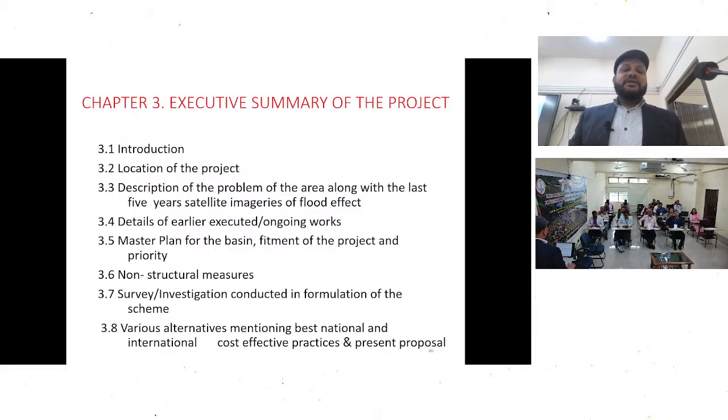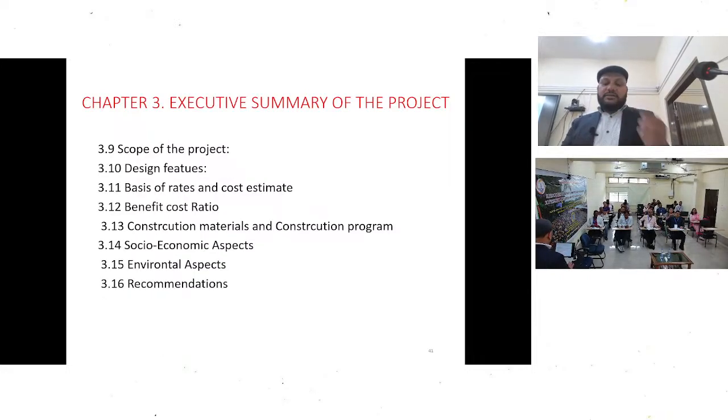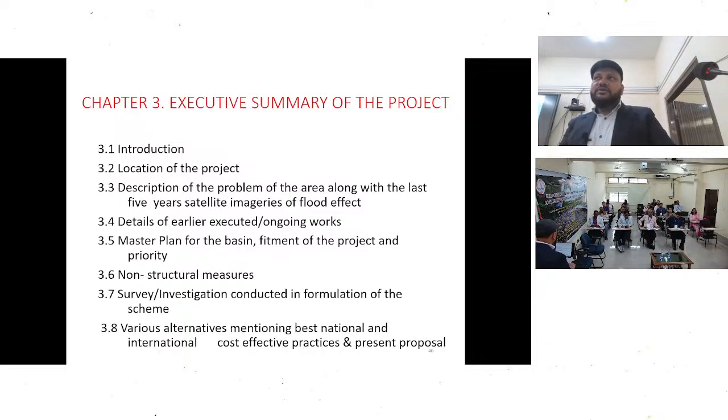There are different points which should be in the executive summary. First should be the introduction: why the project is required, what is the necessity of the project. Then second, the location of the project, its latitude and longitude, and a description of the problem of the area along with the last 5 years of satellite imagery of the flood effect.